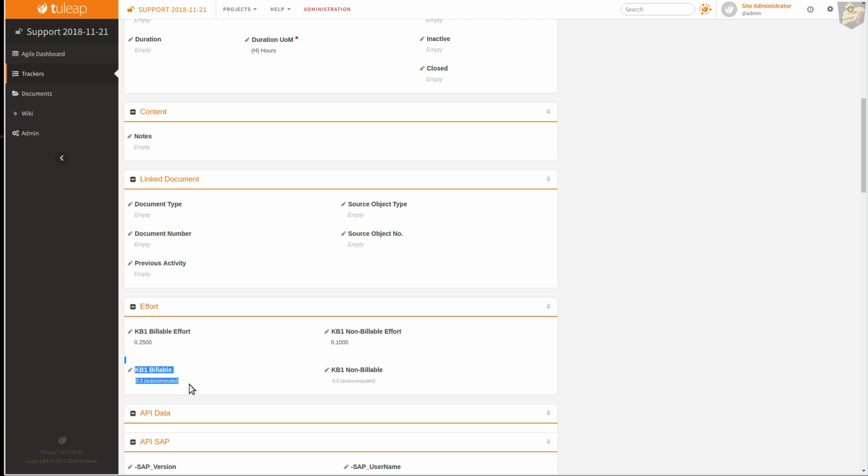So every time they enter in their timesheet, so if you have them do it daily, you can keep really tight reins on overbilling and it going out of control. Because now we see that we've used up 0.3 and 0.5 against what we had originally estimated.